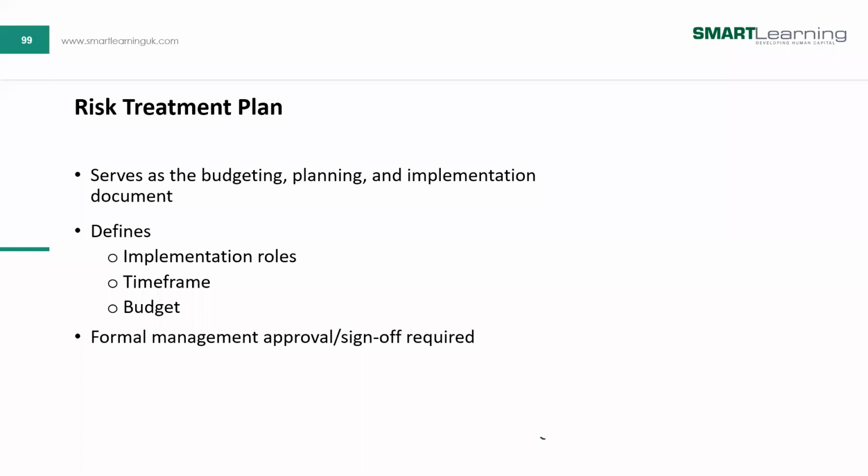Okay? And all of those things go into your risk treatment plan. Yeah? They are now specific. Before now, you had them in your statement of applicability to say we have these risks, and so we'll select these controls from 27002 or 27001 annex. Now we're writing it out in full as controls, and so they go in our risk treatment plan. There are specific actions. They must have budgets. They must have people responsible for them. Yeah, they must have a time frame, and they must have a way of checking their effectiveness.